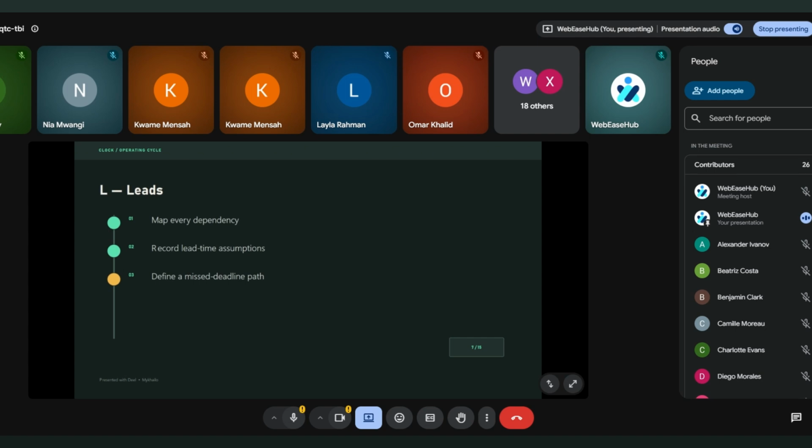I like to map lead time into 5 stages: collection, validation, approval, processing, and communication. Collection is the time required to gather the request and supporting information. Validation is the time to check whether the request is accurate and actionable. Approval is the time required for the right decision maker to approve it. Processing is the operational time to execute the approved request. Communication is the time to tell relevant people what happened or what will happen.